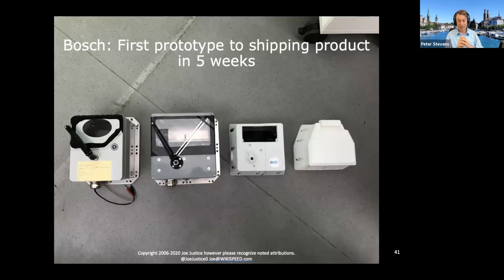Now notice we changed the sprint length here from a month down to a week. And that's actually a pattern in Scrum for hardware, to get very, very short cycles around your hardware development. SpaceX is building the Starship. This is their answer to the Saturn V for the Space Launch System. They're capable of building a new rocket once a month. For this Saturn V class rocket, they can roll out a new test one every month, and they can roll out an upgraded design every 3 months. So we're not quite at a new Saturn V once a week, but we're much better. Their competition is about once every 3 years.